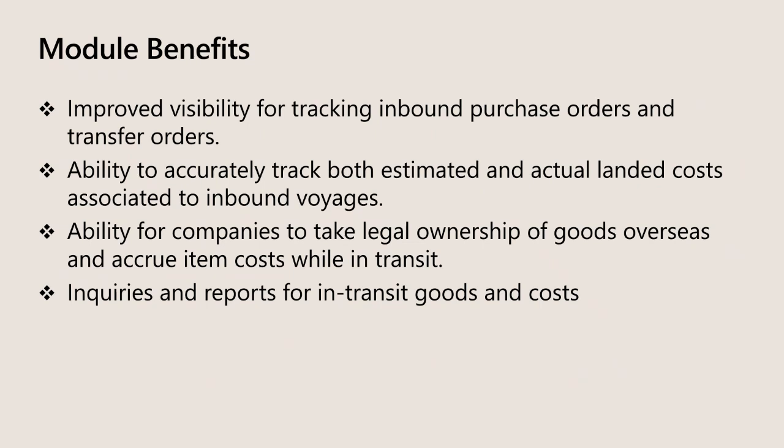Next point here is the ability to accurately track both those estimated and actual landed costs associated for those inbound voyages. So not only can we set up these costs up front of what we expect those to be, but then as those bills come due, or as we get those invoices from those shipping carriers, customs duties, freight, et cetera, we can be logging those in the system, and we can be comparing and contrasting those estimated costs to those actual costs based off the invoices that we receive. And we'll be making the associated general ledger postings as well throughout that.